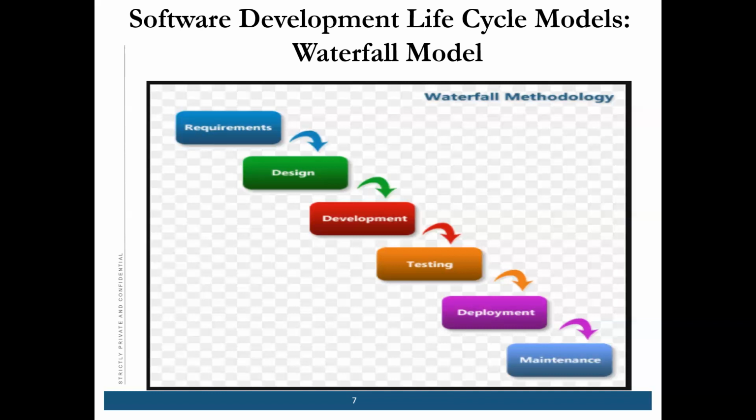See, if any company has completed their documentation, they can go for the waterfall model. Completed means that requirement analysis is completed. Then they can go for the waterfall model. Why? Because the requirement is now frozen, so the waterfall model is good for them.